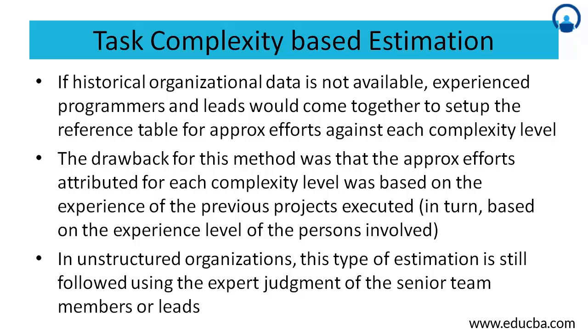So consider a case wherein you initially had more experienced and high profile programmers or tech leads in your organization, and at a later date you have a mix of programmers who are not very senior. Now this reference data would give you efforts which tend to fall short for inexperienced programmers or freshers. So when the organization looks to fine-tune this reference table, they need to account for this factor.